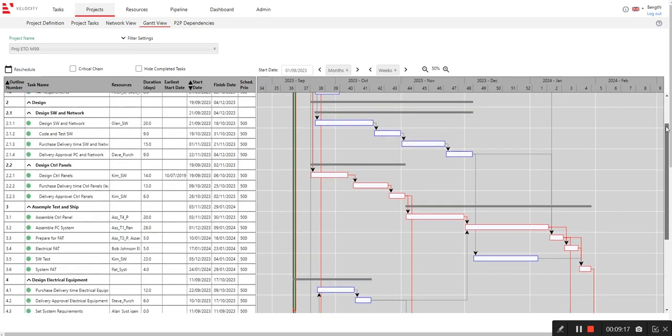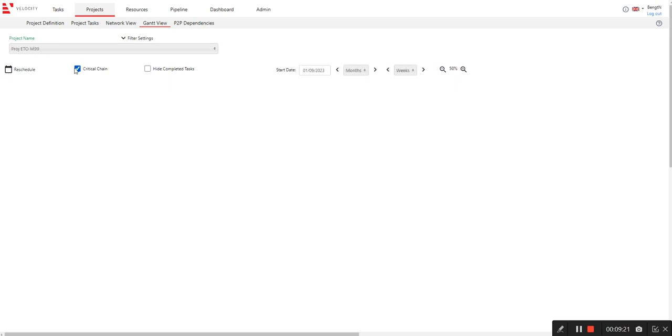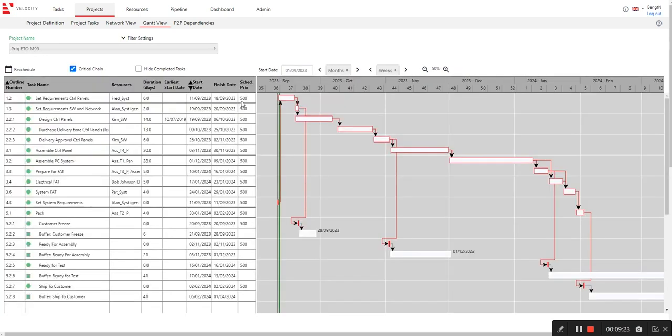That's great. And if we now look at the critical chain, we can see that all the chains are now logical dependencies. So in some sense, the critical path and the critical chain are now the same. So the only way now to speed things up is actually to make these tasks go faster. And that is much more difficult.